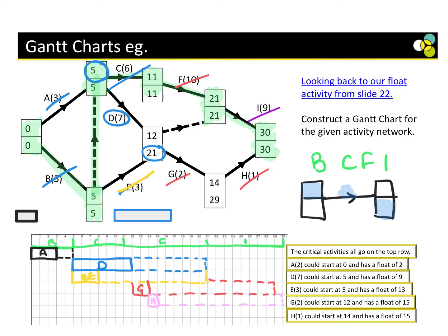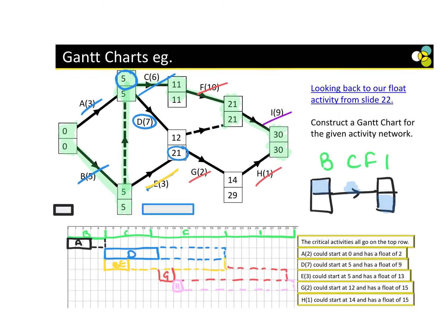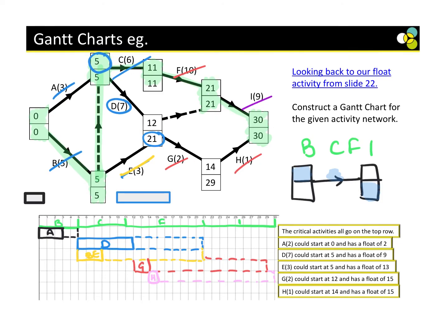What is the minimum number of people I need to help me to complete this cake? Have a think about this, off you go. So this is a Gantt chart. What I'm now going to look at typically is scheduling diagrams would also help us find the minimum workers. Now we had a few different answers, 2, 4 and 3. Okay, so first of all, everyone's in agreement that only one person can do the critical path, and they're not going to have any breaks.